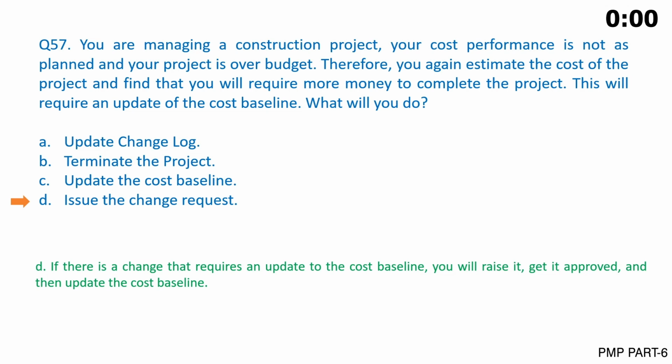The answer is D. If there is a change that requires an update to the cost baseline, you will raise it, get it approved, and then update the cost baseline.